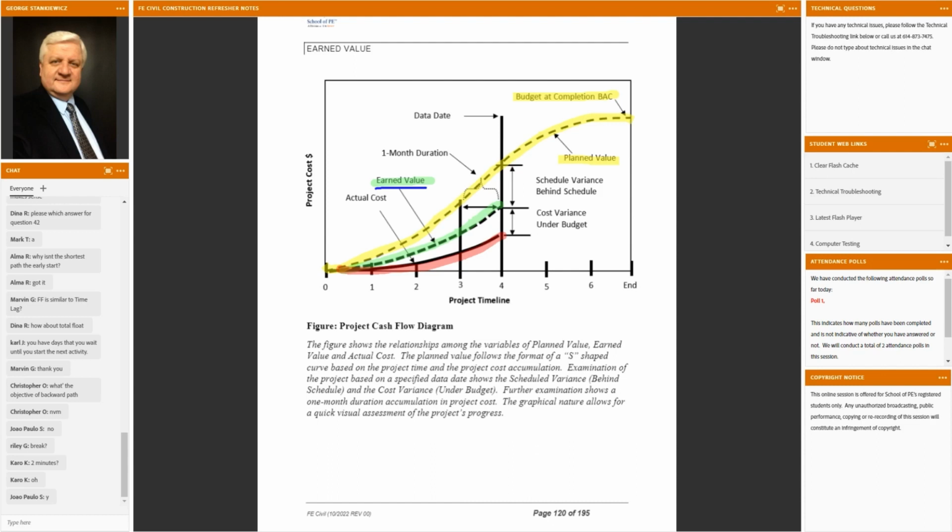However, there are variances. And so what we can identify here is that we have a schedule variance. Let's put our point on here. So this identifies a schedule variance, because what we had planned is not coming together with what we earned. We also have a cost variance. We're under budget when we look at this. This cost variance is right here. So we're spending less than what we're earning, and so that's another association that you'll find here.